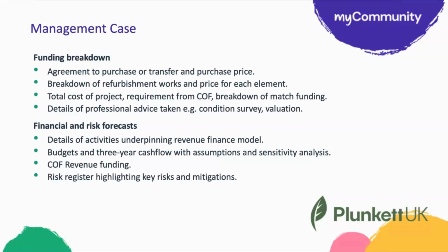My sense is that some groups have underplayed the risks and have just said, no, this is all fine, it's not too risky, whereas there clearly are all sorts of risks. Let's say you're buying a pub. The risks are that it's a tenanted model and that you can't take on a decent tenant, or they leave after the first 6 months.